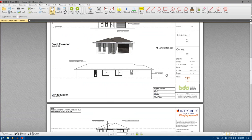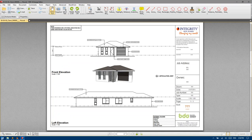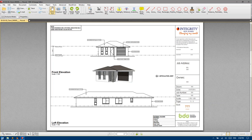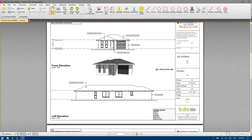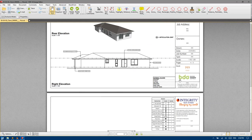Especially if they sign plans with a cabinet maker and someone else, they can end up forgetting what kind of house they're getting or think they're getting things that have never been agreed to. So this colour box was an extension of that. We decided to take some of the external colours — which if delivered to site incorrectly could be quite costly to rectify — and started writing those onto the actual plans themselves and getting those endorsed simultaneously.